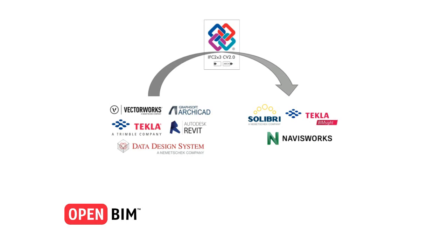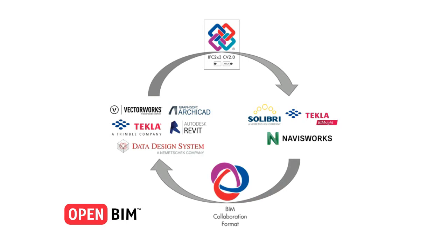Once the quality control is done, BIM coordinators can export their comments in BIM Collaboration Format, another buildingSMART format, allowing the comments to be accessible in the native modeling tools. The BCF contains information such as creation date, snapshot image, comments, but most importantly, the location, the view the user had when the comment was created. This feature helps to retrieve the location of the issue in a single click in the authoring software, saving modelers a lot of time.